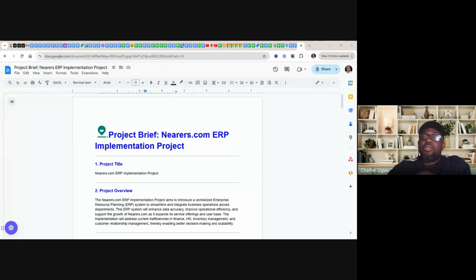If we don't have any other question at this point, the next thing is we'll have a guide on how to run a project. So the project is out already. We'll have team members call a meeting and do the first thing we are supposed to do, the kickoff meeting. Address what you need to do, the project breakdown structure, and from there you start coming up with requirement gathering. If you meet me at requirement gathering, then we'll talk about whatever information or questions you bring during the requirement gathering. So if I happen to be one of the stakeholders that you are going to meet, I will address any question you bring based on the requirements of this project.